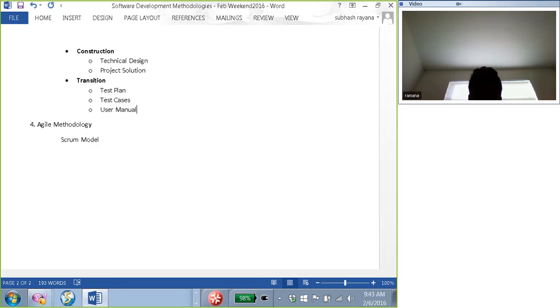You will document the change request, whatever change they're asking, and understand the impact of the change. And again, as I said, there may be a budget impact or a schedule impact, a delivery timelines impact. All this analysis is done by the technology team and the project manager, and it is presented to the business. See, sometimes the change could be as simple as changing a sentence displayed on the web page.